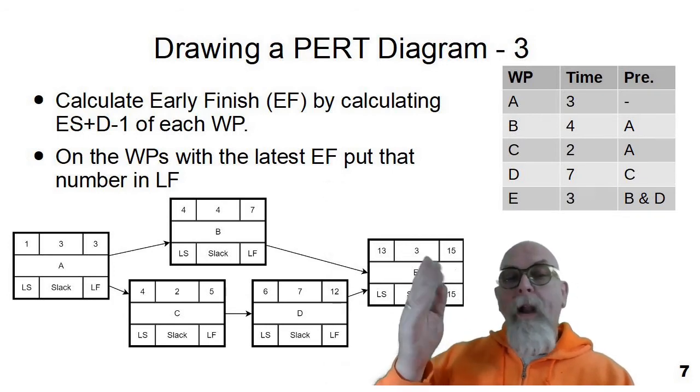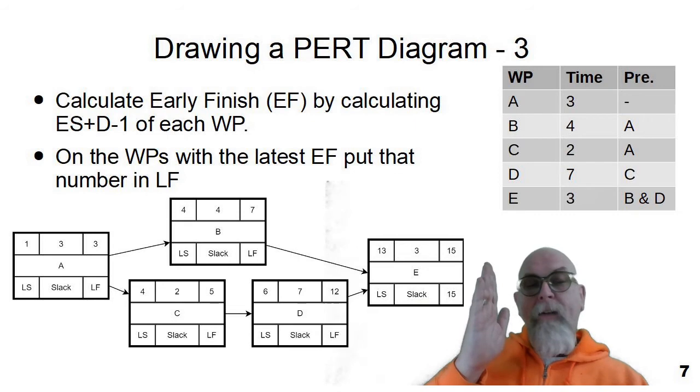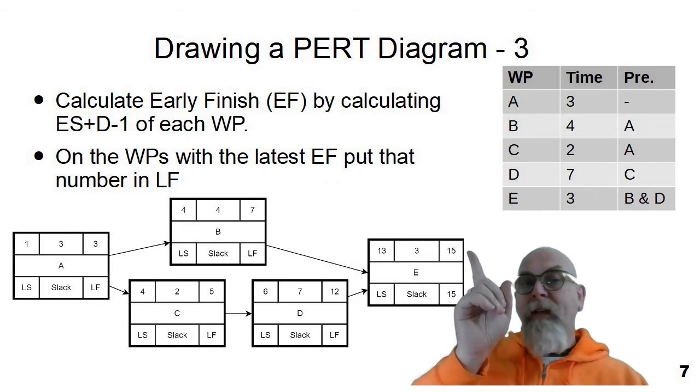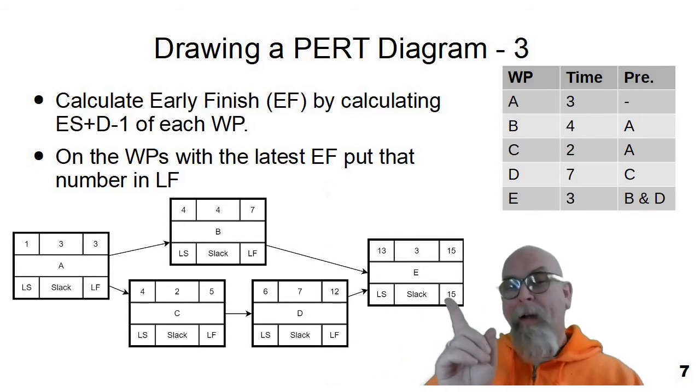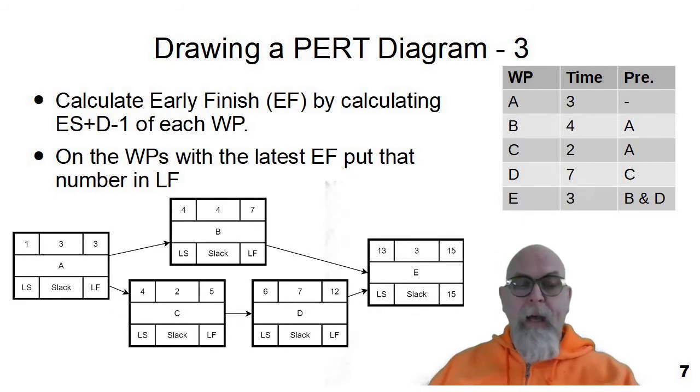Also, whatever your work package is here at the very end of the job, all of your finishing work packages, you take this early finish and copy it down as the late finish. And then we're going to work backwards through the diagram, populating late finishes in our next slide.